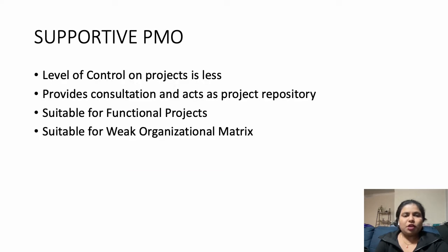Supportive PMO. The supportive PMO acts as a consulting department for projects by providing suggestions and resources required by the project team. The project manager or team member needs to approach the PMO for getting their inputs. This supportive type of PMO has very little influence, as it only serves as a project repository or supplies resources such as templates, best practices, training, information access, and lessons learned from other projects.